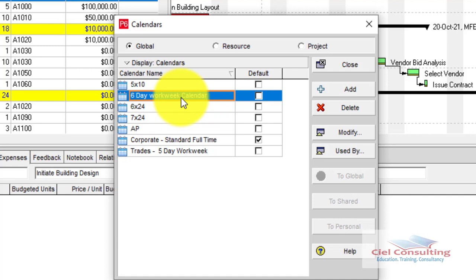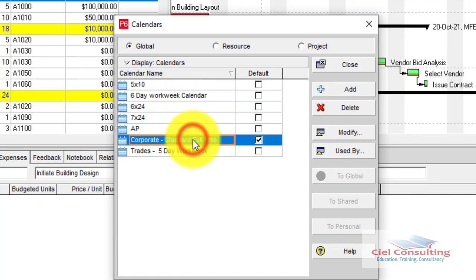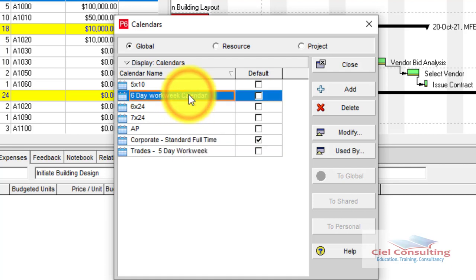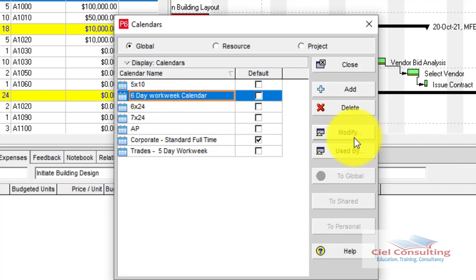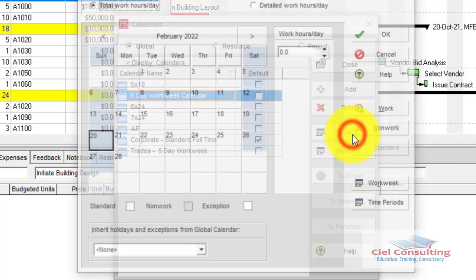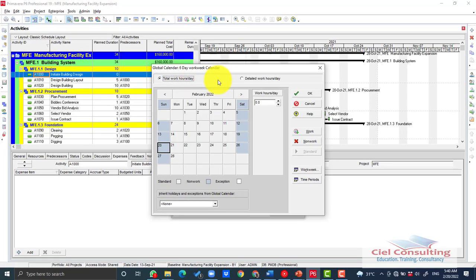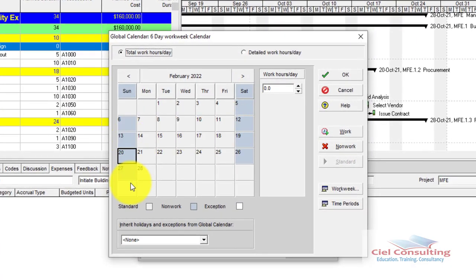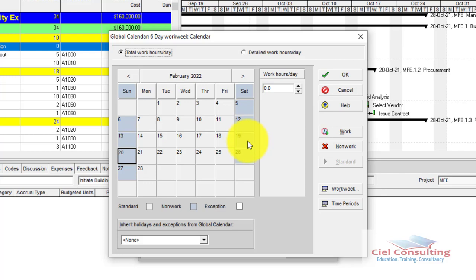However, we copied the Corporate Standard Full-Time Calendar, which is a five-day workweek. So we need to modify this new calendar to truly convert it to a six-day workweek. Select the Six Day Workweek Calendar and click Modify. The Modify window shows up, and you can see that Saturday and Sunday are grayed out, indicating they are non-working days.